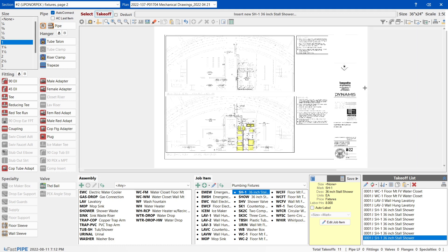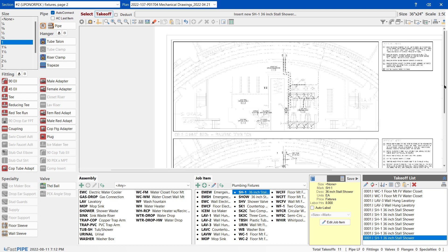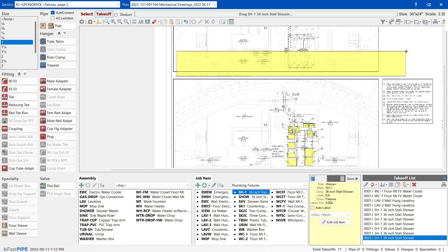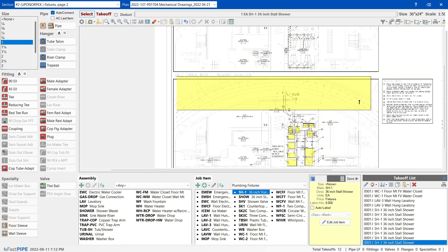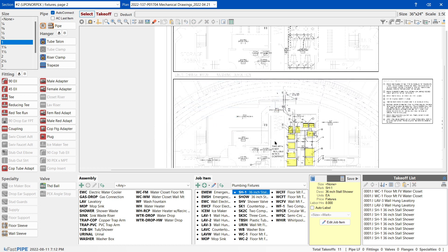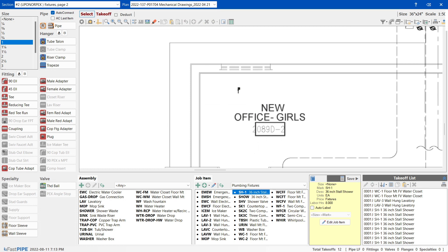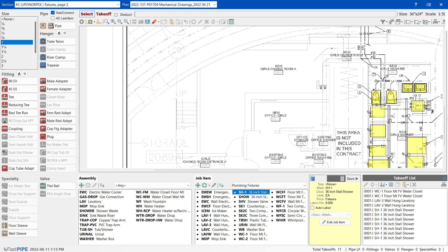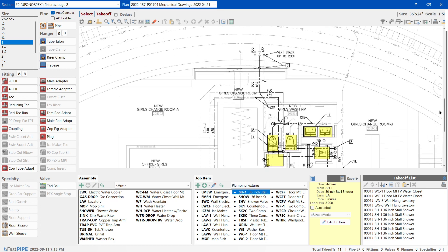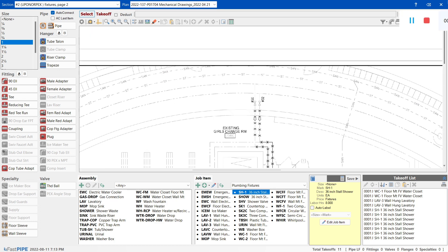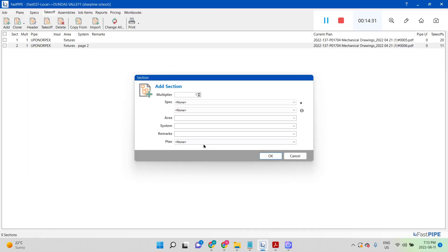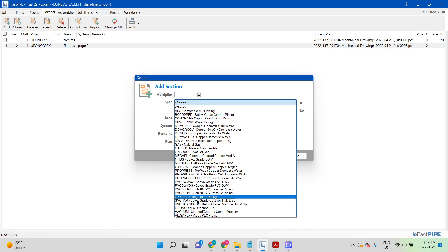Now I go back up here - they have more information like this when you read it. This is existing and this is new. I don't want to add a fixture that's existing. Be careful - a fixture can be this big or this small, it's all fixtures. Watch: I'll click it and you won't be able to see it but that's actually the shower and the shower was two thousand dollars. Now you owe two thousand more. You've got to be very careful with all that.